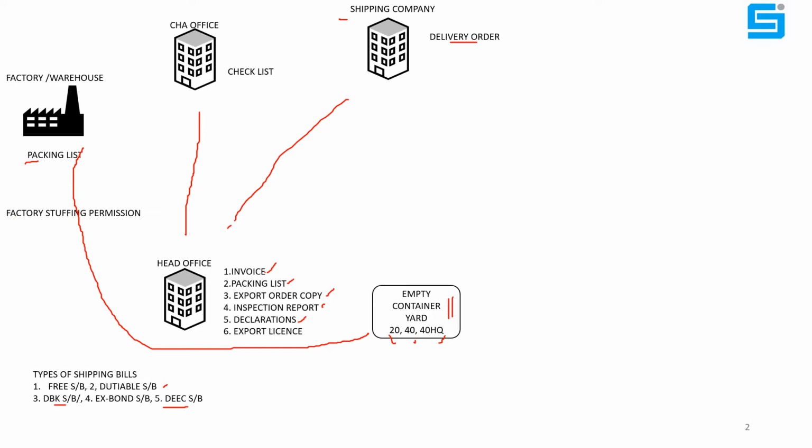Okay, sent for the factory because cargo is lying at the factory. The empty container goes to the factory for the stuffing. Please remember, you are not supposed to stuff container in the factory unless and until you have the valid factory stuffing permission. What is the factory stuffing permission?